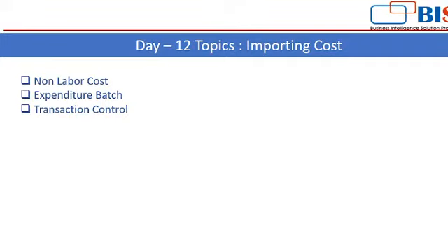So what we will do, we will create the equipment cost on the basis of hour and it will charge on the hour basis. Say I have a project A and is using the equipment of the organization for 10 hours. So whatever the 10 hours rate is available for that equipment, it will be applicable to that project.